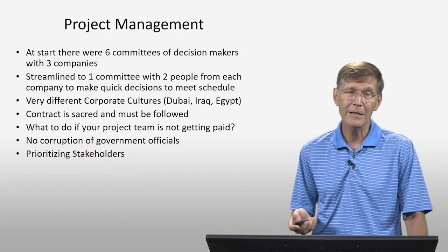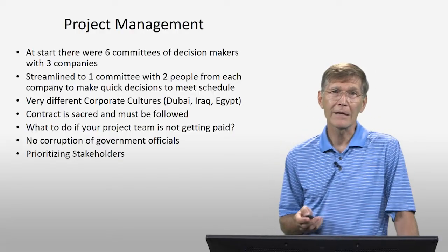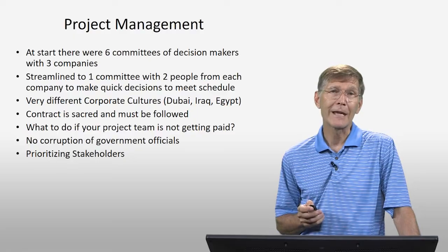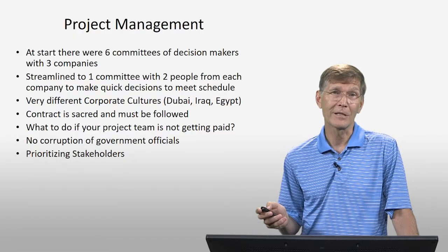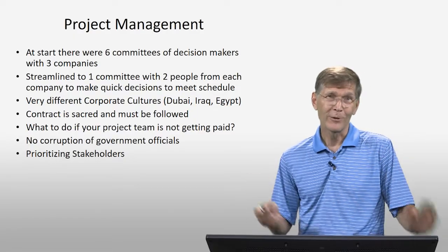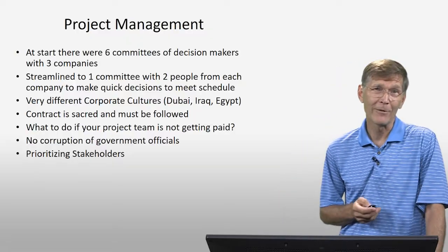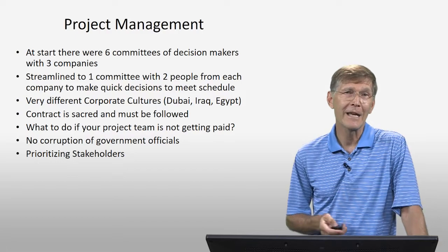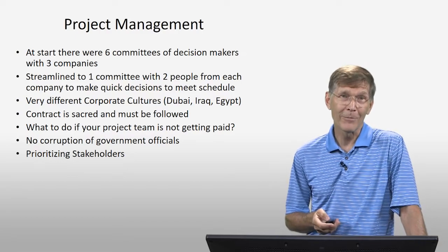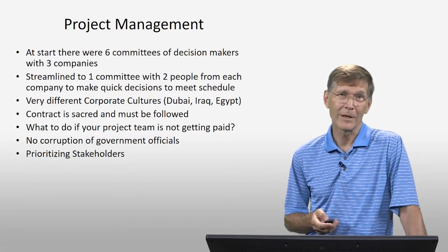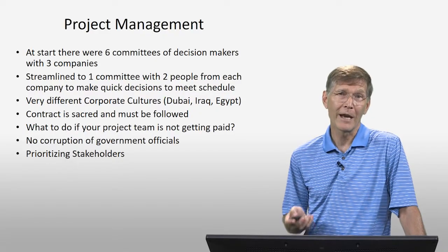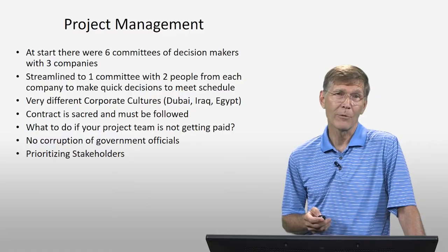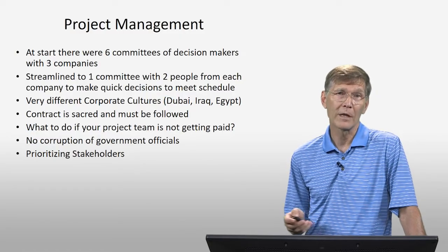I called them, I explained to them, no one's getting paid, and I said if they don't get paid, I'm sending everybody home at the end of the day. And at the end of the third day, I sent everybody home, and I shut the project down. Well, you can imagine what hit the fan, and everybody was very upset, and we had these horrible meetings for the next day, but within 24 hours, everybody had gotten paid, okay? And we got the project back on track, and we got everybody to come back in, okay? And we got the project up and running, and it ran quite smoothly after that.